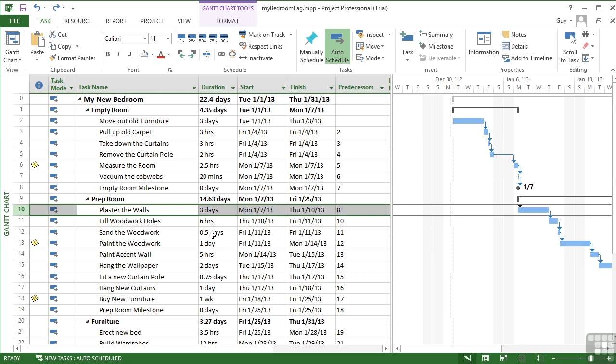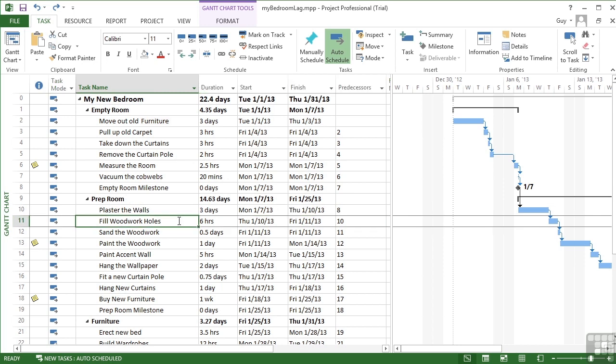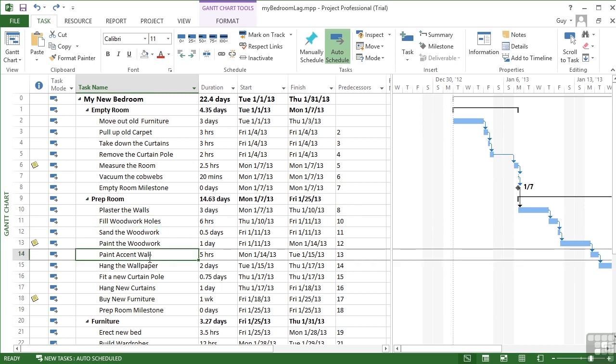Well, firstly, we need to find the tasks that require some lag. So when we've plastered the walls, whatever succeeds plastering the walls is going to require a bit of lag. And we can see that we're going to fill the woodwork holes after we've plastered the walls. Well, that's not too much of an issue because we're not going to interact with the walls. So the task that follows on isn't a problem. Where we do need to make sure is that here when we paint the accent wall, we've actually allowed enough time for the plaster to dry.